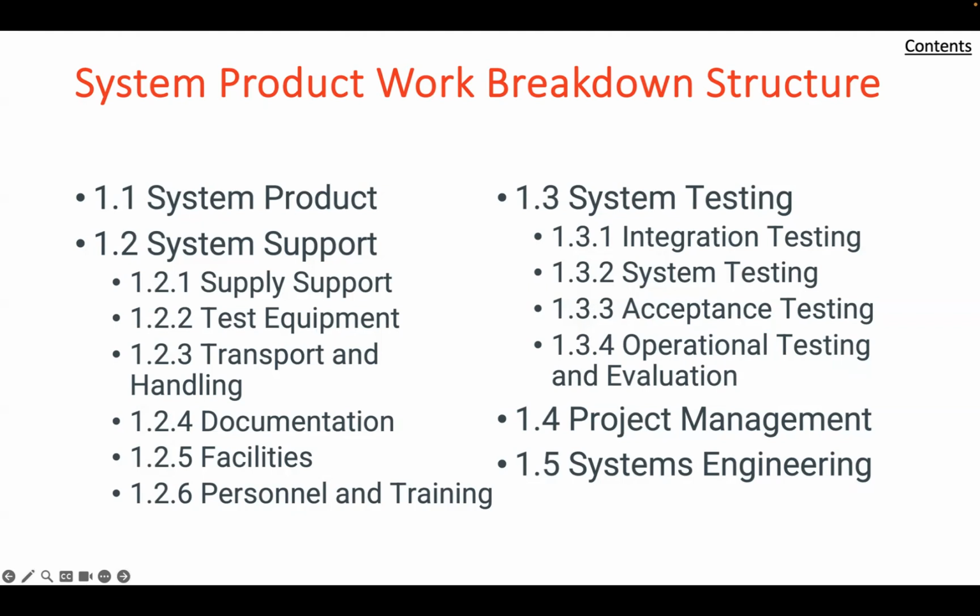Then if we consider the layers below that, the level 4 and 5 breakdowns of one of the subsystems into constituent components, which represent definable products of development, engineering, and production effort. It is preferred that integration and test of hardware and software components is done separately for each subsystem, and hence the tested subsystems are integrated into the final system for testing.